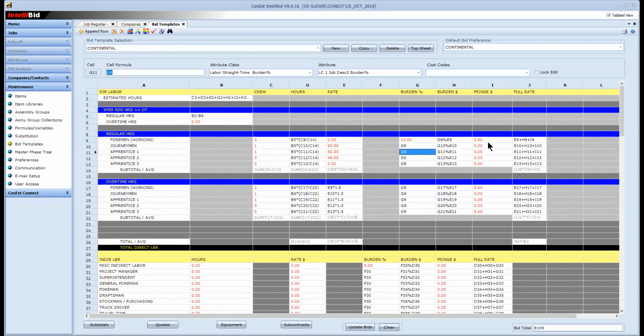Fringe dollars, vacation pay, holiday pay, is that all included in the 60? If it is, I don't need to worry about it. If it is not, then I can certainly put those numbers in separately. And these are dollars. So I have $2.20 fringe on my journeyman, on my apprentice. I have $1.80 as the fringe. Fix that here.